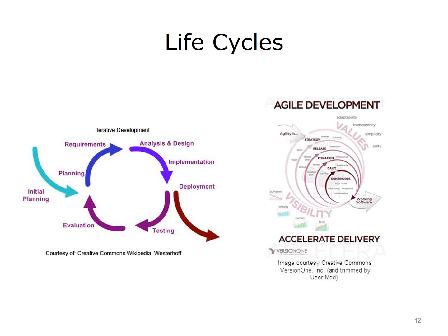For now, briefly, project life cycles include a linear method, which is typically best applied to large, complex projects, while iterative and adaptive methods are more appropriate for rapid application development or projects that occur over short periods of time and require high levels of prototype development, feedback, modification, and redelivery. Agile techniques are best used in small-scale projects or on elements of a broader project that require a quick turnaround.